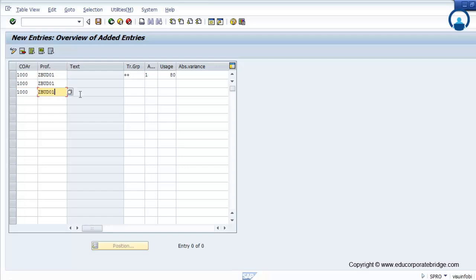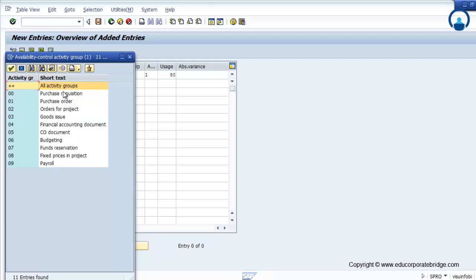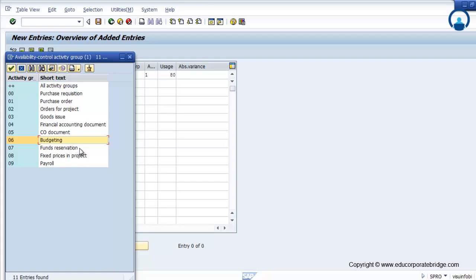The plus-plus sign indicates it is applicable for all. The budget will be checked during purchase requisition, purchase order, GRN, service entry sheet, or FI transaction. You can find different options: purchase requisition, purchase order, orders for a project (that is, production orders against projects), goods issues at the time of material issue, financial accounting direct posting against the WBS, CO document direct posting against the WBS during budgeting itself, fund reservation during fund management, and payroll linked with HR and PS module (CATW).